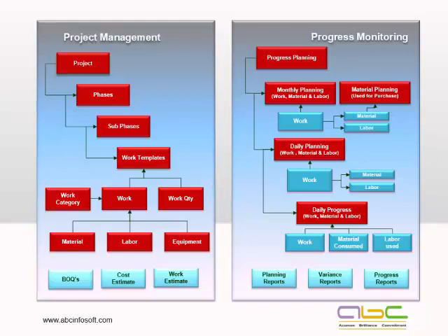Let's start with the flow of the project management. Initially, we'll be defining the project along with its various phases and sub-phases. Like I told you, suppose there is a residential project with apartments. We have multiple towers or blocks for this. So we can have a block or a tower as a phase, and then we can have multiple sub phases. Like it could be floors, and then we come down to a lower sub phase, which could be the flat or the unit. Now, with each subphase, we'll be simply attaching a work template.